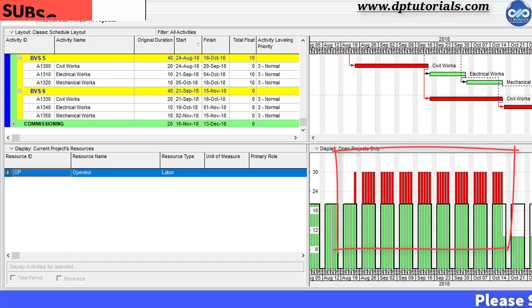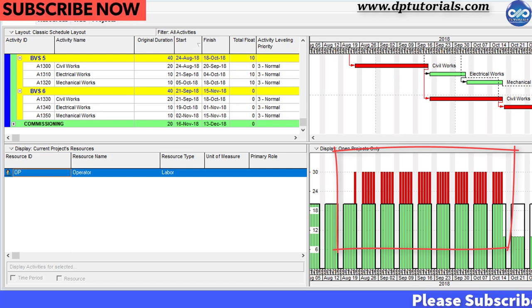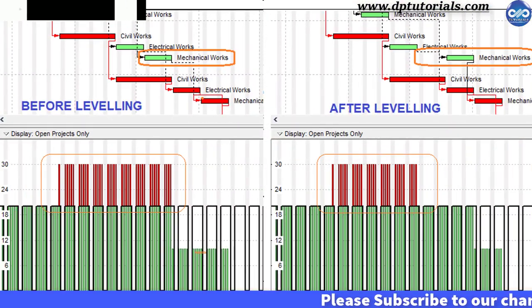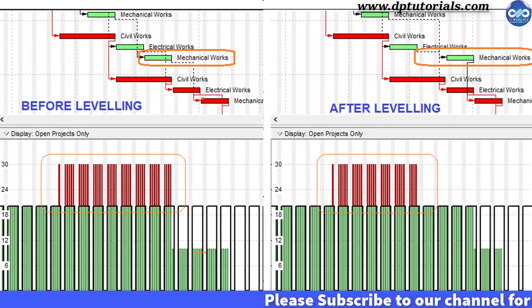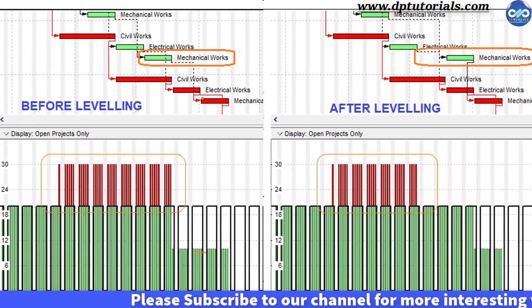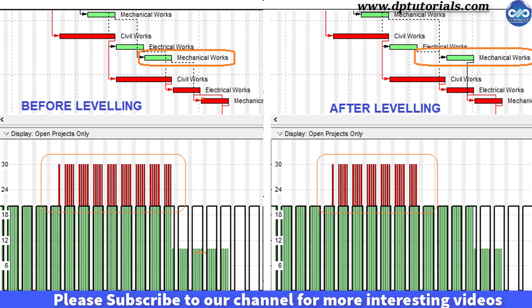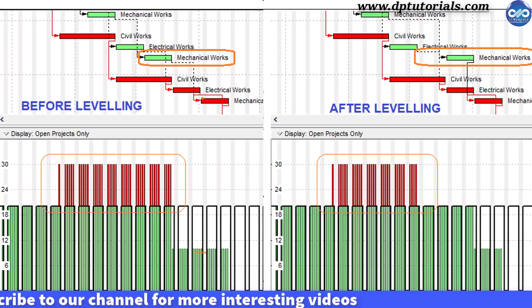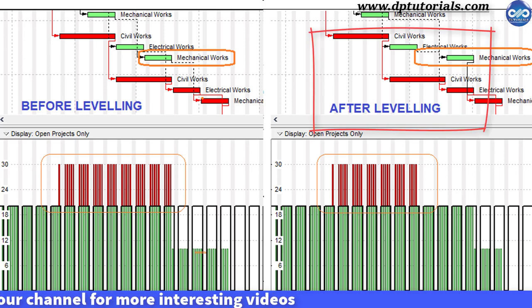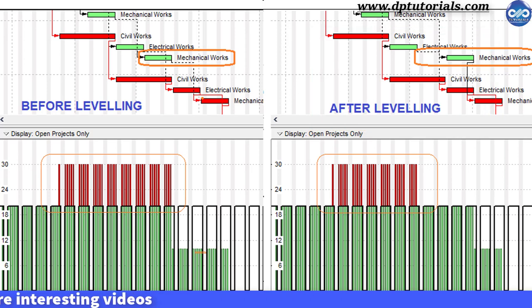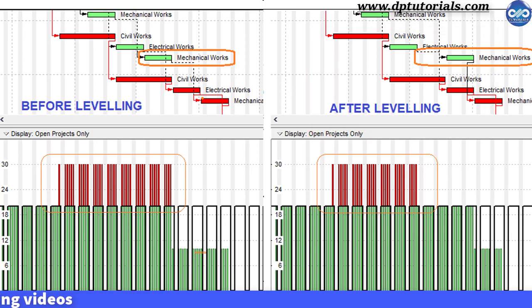This can be done based on priorities that you define at the project level or at the activity level. This tool is the best one for capacity planning and also to analyze the impact of resource over allocations. Now let us see how to use this feature in Oracle Primavera P6.